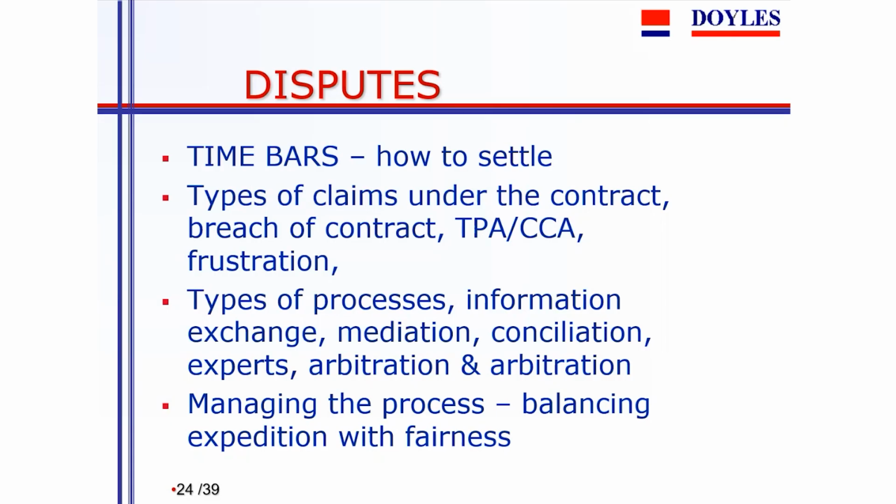If the parties are not wanting to agree and don't come to an agreement, then the mediation will fail, and usually the mediation is without prejudice, so everything that's said there is confidential, and you have to start again in a different process. So mediation offers you the opportunity of settlement, but doesn't provide a certain settlement at the end of it.